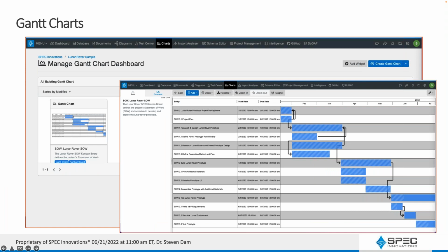Gantt chart, similarly, again, this is a very nice looking Gantt chart format output. It does have dependency lines. Dependency is a new entity class that we came up with for this chart. It allows us to do start to finish, finish to start, those kinds of things. So you can identify what those are, and then the lines will follow correctly for those instances.